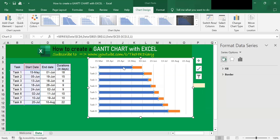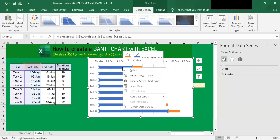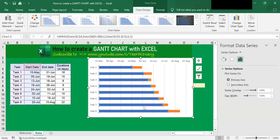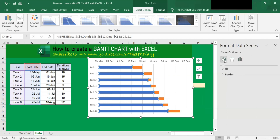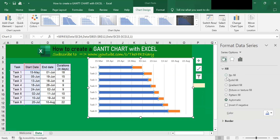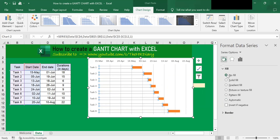Now, I don't need these blue bars. So to hide these blue bars, right-click on any of them and click on Format Series. Then go to Fill, expand this, and click No Fill. Once you click No Fill, you will see the bars disappear. The blue bars on the left are now gone.